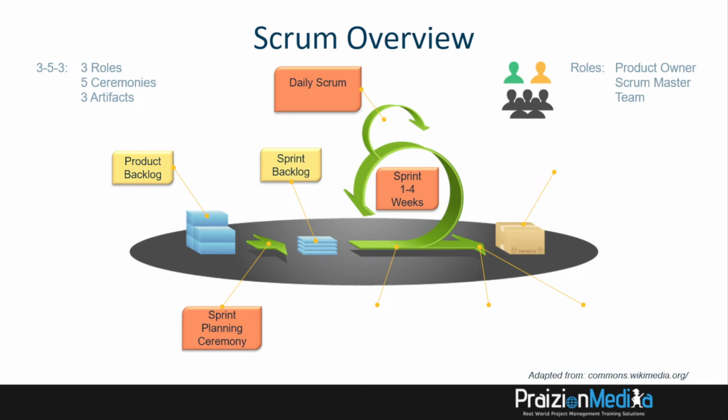During the sprint, we have daily scrums, and the daily scrums are sync meetings, meetings where we plan, meetings where we discover if there are problems, which we call in the world of Agile impediments. Some people refer to these as obstacles or blockers. After finding these impediments, we tackle them outside of the daily scrum, not within the daily scrum event, but outside.